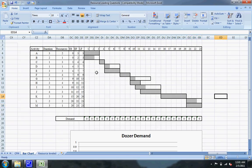I'll put in how many resources are needed for each of these activities. Then we can look at the dozer demand graph, which will show us how to resource level our project.